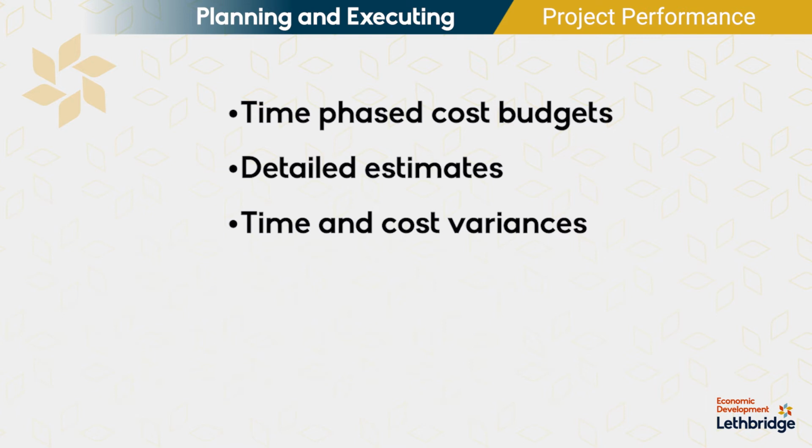So we then look at schedule variance, and schedule variance is calculated by subtracting your planned value from your earned value. In the above case, the schedule variance would be negative $10,000, meaning you are behind schedule. Cost variance is calculated by subtracting actual costs from earned value. If this is positive, you are under budget; at zero, on budget; and negative, you're over budget. So we have our cost and our schedule variance.